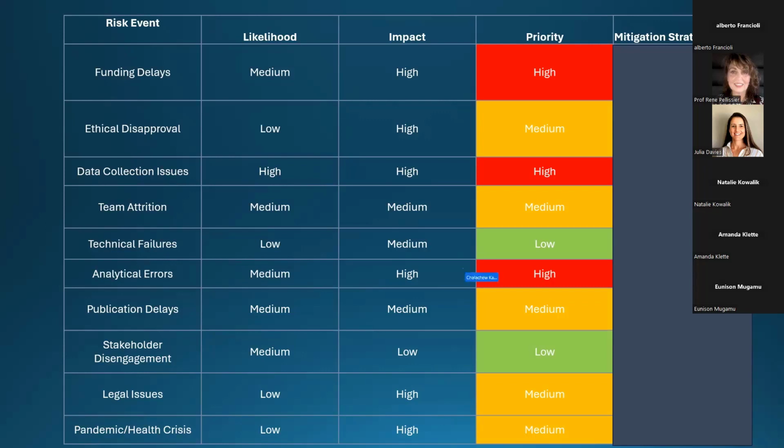Those numbers I can actually sort, and the ones with the highest priorities are the ones that I really need to be very careful about, because between likelihood and impact, they're now getting dangerous. Once I have highs, mediums, and lows in the priority lane, I color them so that it makes it easy for me. I made the high priorities red, the medium priorities amber, and the low priorities green. Now I know I need to watch out for the red ones first.